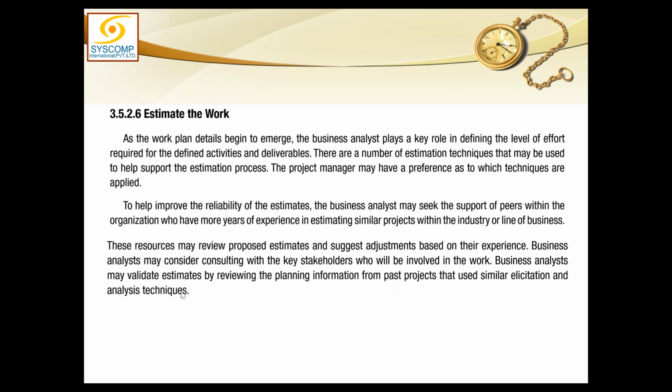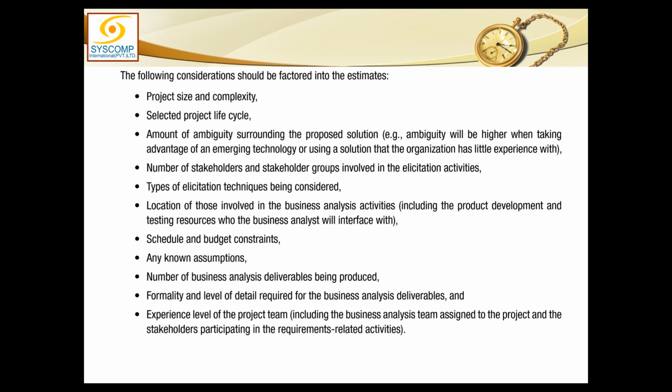Business analysts may validate the estimates by reviewing the planning information from past projects that used similar elicitation and analysis techniques. So we see that the business analyst needs assistance in coming up with an estimate for the work, and that is going to be a high level estimate.